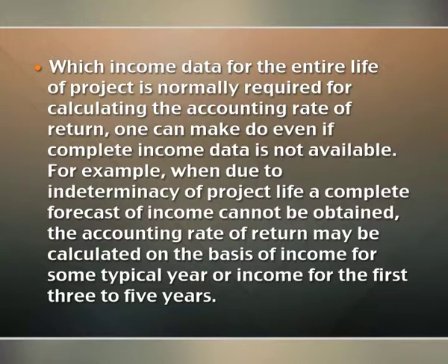While income data for the entire life of the project is normally required for calculating the accounting rate of return, one can make do even if complete income data is not available. For example, when due to indeterminacy of project life a complete forecast of income cannot be obtained, the accounting rate of return may be calculated on the basis of income for some typical year or income for the first 3 to 5 years.